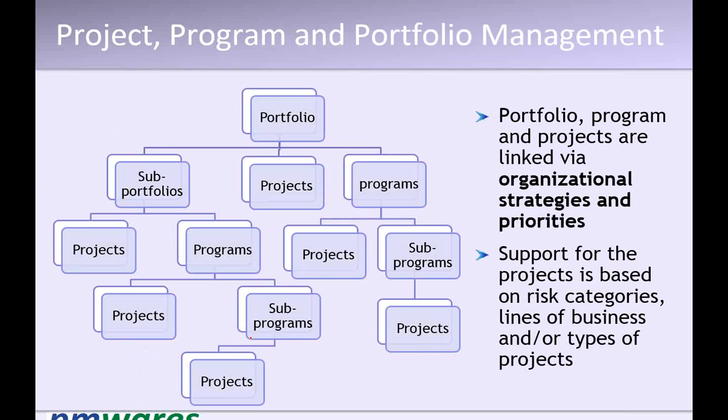Now what this telecom group will do, it will find out all the projects in the organization that are servicing the telecom clients and bring them together. When they bring them together, there is a possibility that a few projects will be working for a specific client in telecom. So that program will also come under the portfolio. So this program along with these projects will come under the portfolio. So a portfolio can have projects as well as programs.